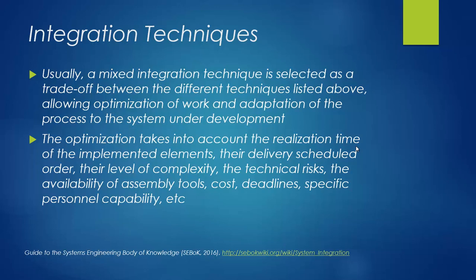Also, it accounts for their delivery schedule, the order they should be delivered, and their level of complexity and the technical risks. In addition, it will consider the availability of the assembly tools, cost, deadlines, and specific personnel capability. Also, if there are any other constraints or requirements for the specific system, those will also be included.